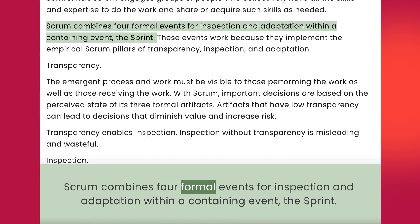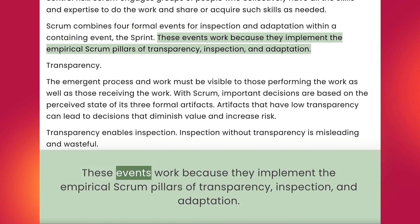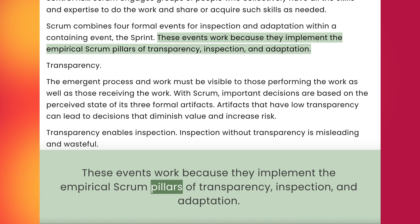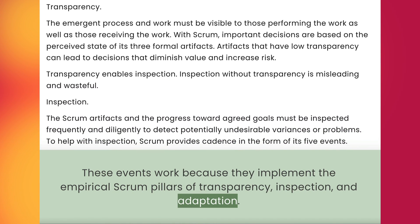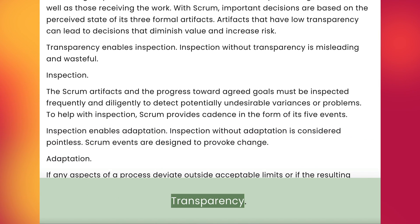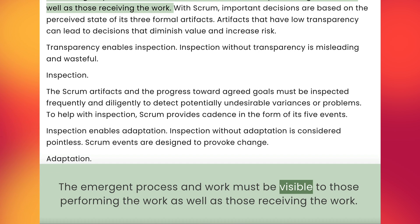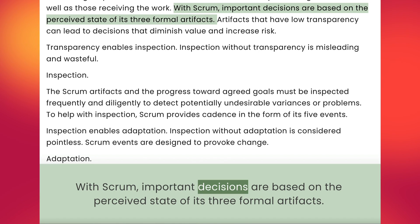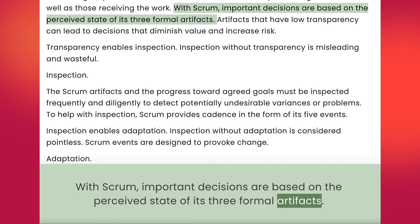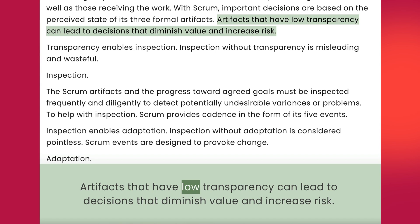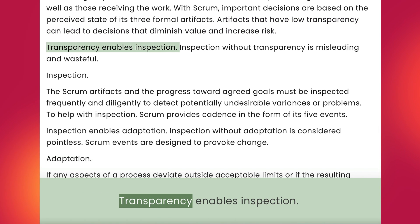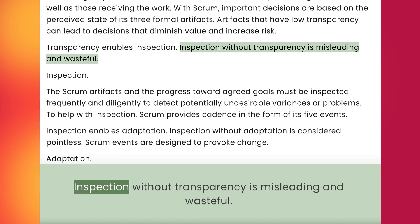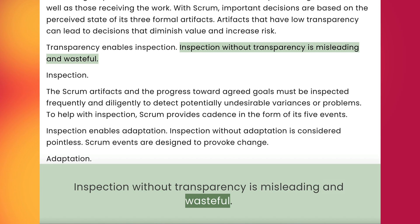Scrum combines four formal events for inspection and adaptation within a containing event, the sprint. These events work because they implement the empirical Scrum pillars of transparency, inspection, and adaptation. Transparency: the emergent process and work must be visible to those performing the work as well as those receiving the work. With Scrum, important decisions are based on the perceived state of its three formal artifacts. Artifacts that have low transparency can lead to decisions that diminish value and increase risk. Transparency enables inspection.